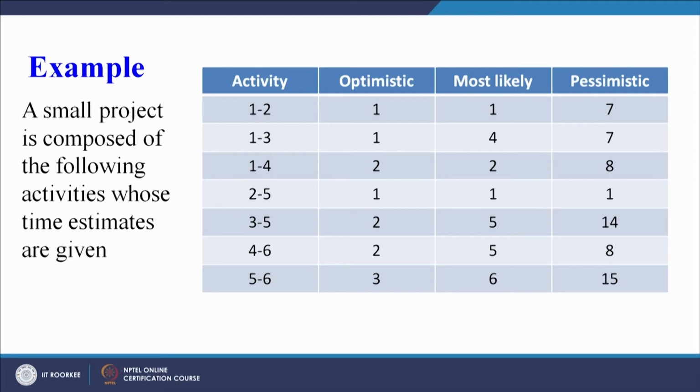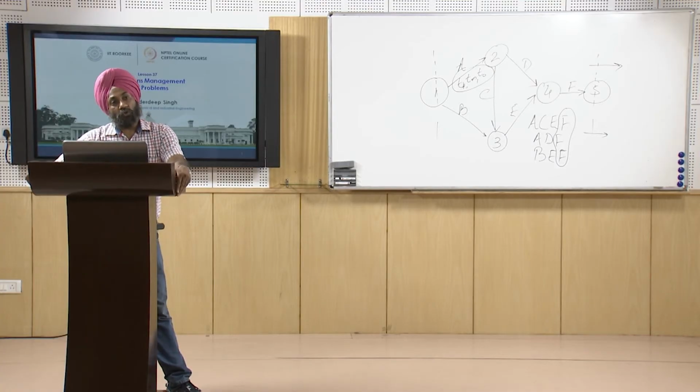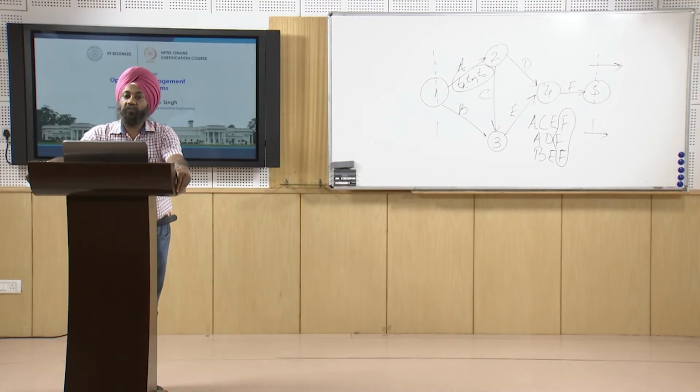So this is one easiest representation, because when we have the precedence relationship given, we have to first construct the network satisfying all the precedence relationships. So that additional job is added for constructing the network, and sometimes we have to use the dummy activities also in order to ensure the logic of precedence relationships.